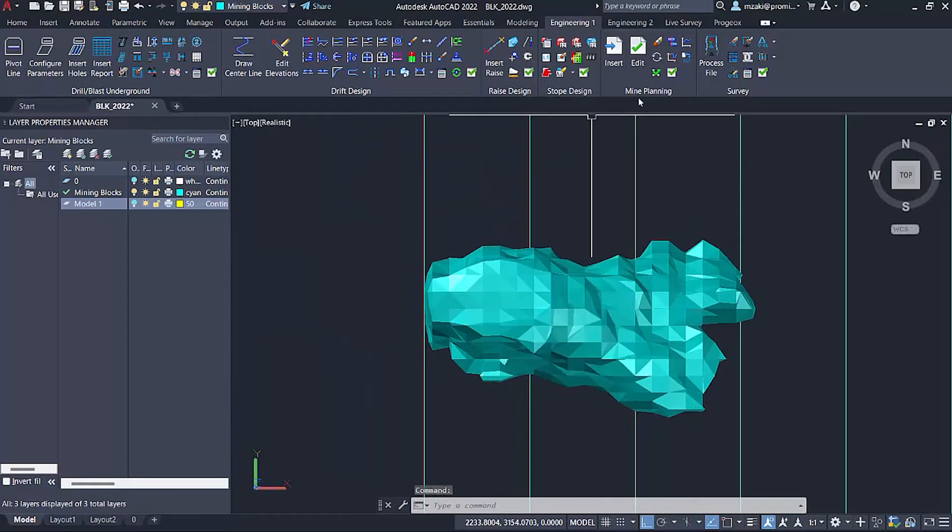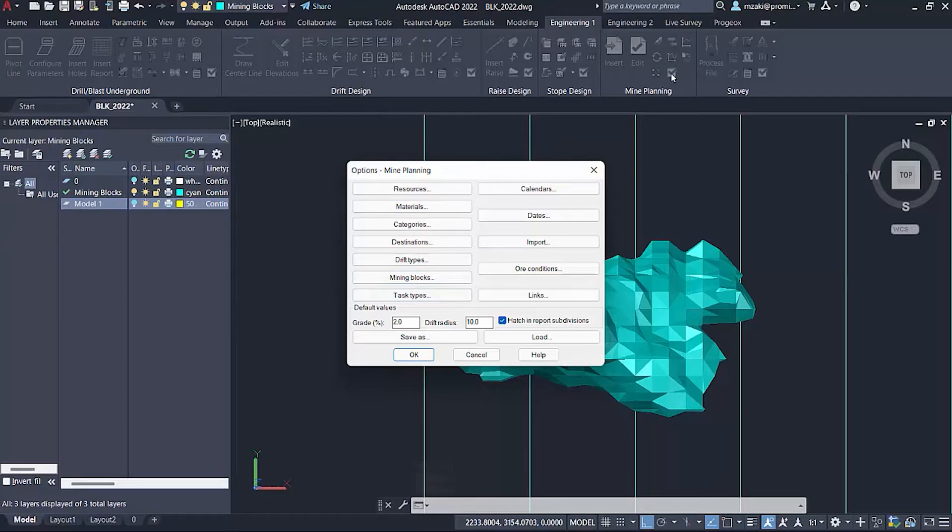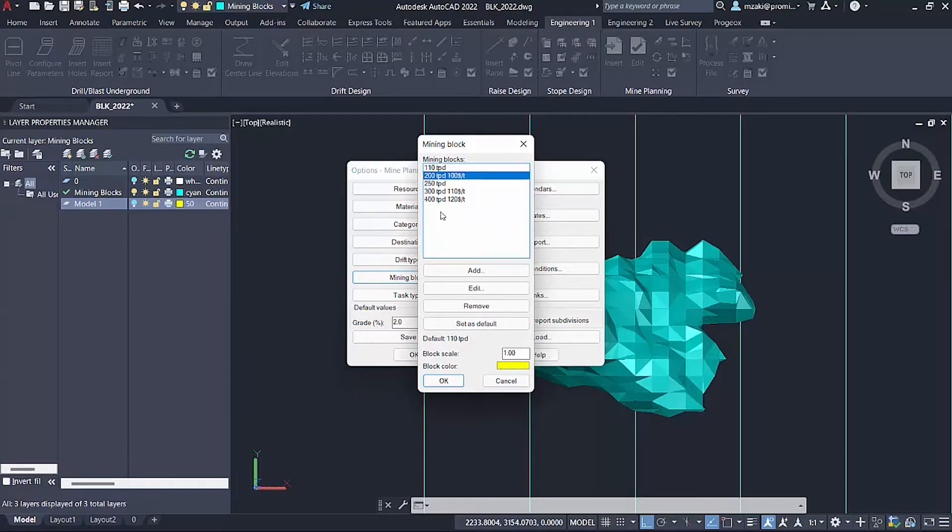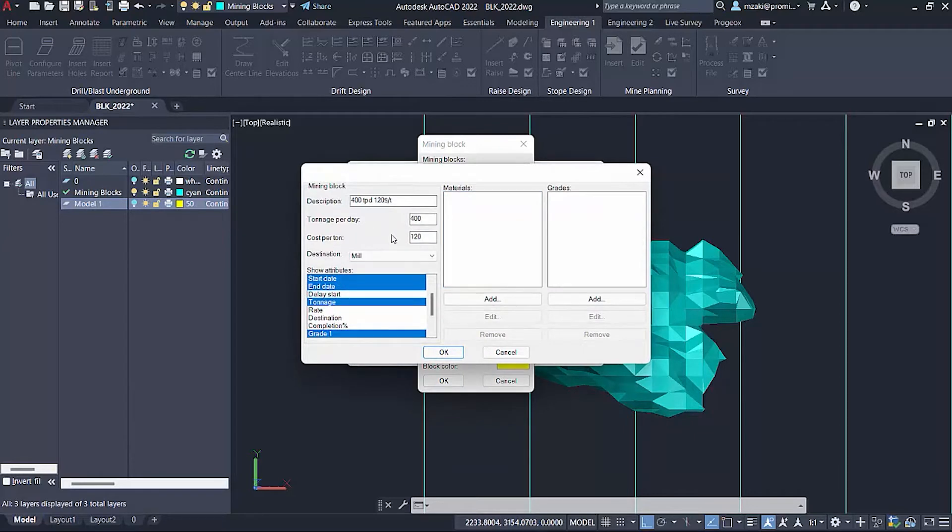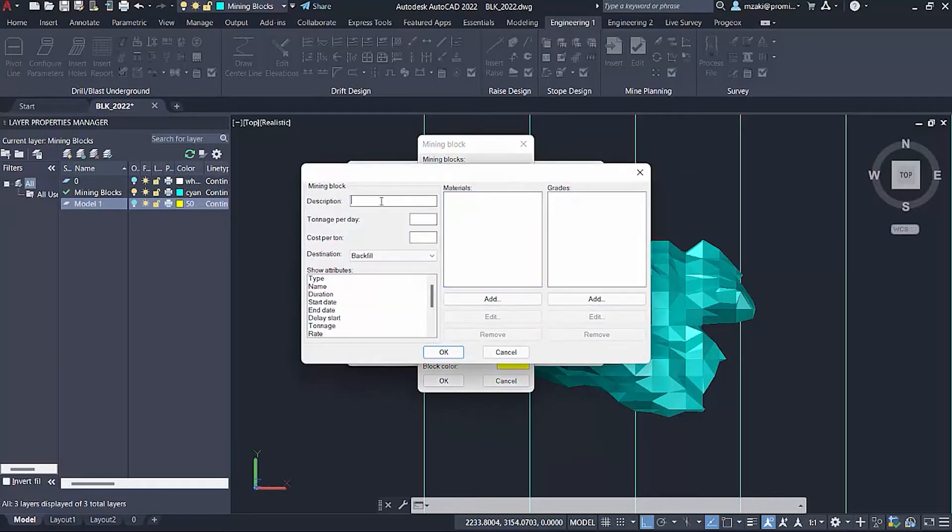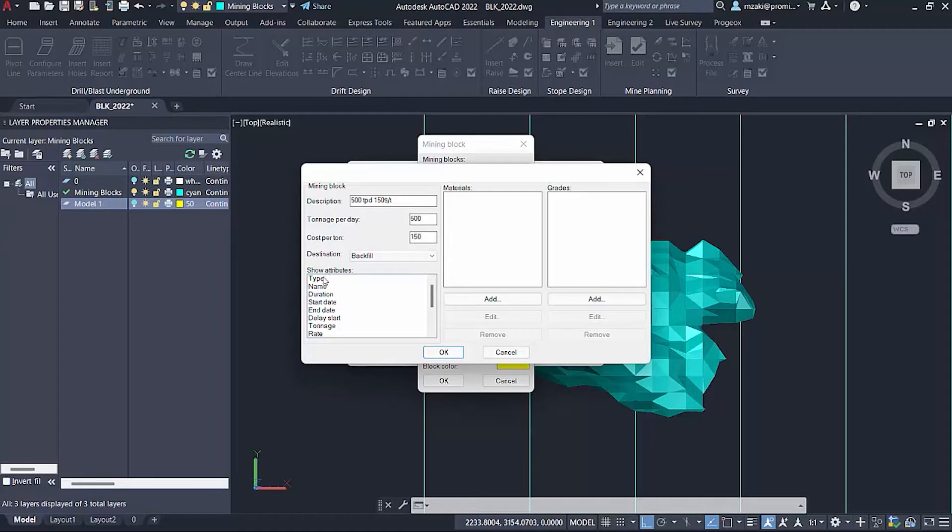Next step is to use the mine planning module. First we need to configure in the options our mining blocks. Click on module options and then mining blocks. In here you already have pre-configured mining blocks. We're going to create our own custom mining block: 500 tons per day at $150 per ton. The tonnage per day will be 500, cost per ton will be 150.